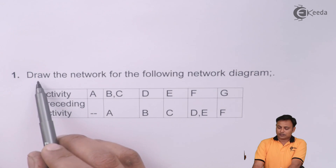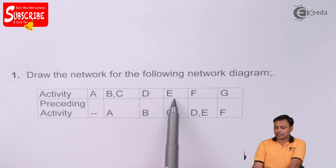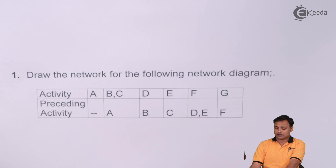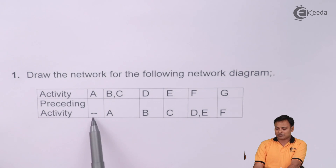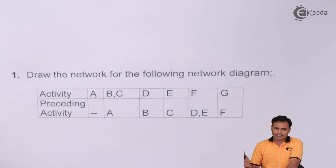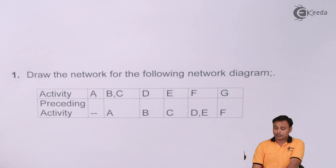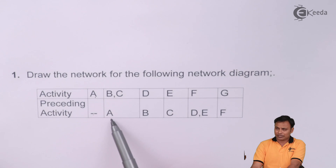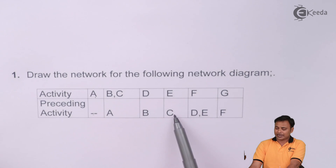Here is the problem: draw the network for the following network diagram. We have activities A, B, C, D, E, F, and G — seven activities total. The second row shows the preceding activity. Against A there is a dash, indicating there is no activity before A, so A is the first activity. Before B and C comes activity A. Before D comes activity B. Before E, the preceding activity is C.